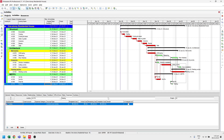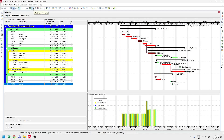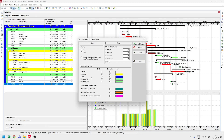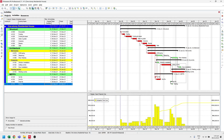After we assign cost to each activity, we can now generate the S-curve. Primavera automatically distributes the assigned cost throughout the duration of each activity. Let's click this icon. Now it's going to show the budgeted labor units, the actual and the remaining. We have to change the settings since what we want to see is the cost or the cash flow of the project, not the labor units. Click this drop-down and select this option. On this window, select cost. On the right, select total. Here at show bars or curves, check the budgeted for both by date and the cumulative. Then uncheck everything else. Now let's click OK. After that, you can now see the S-curve of the project.